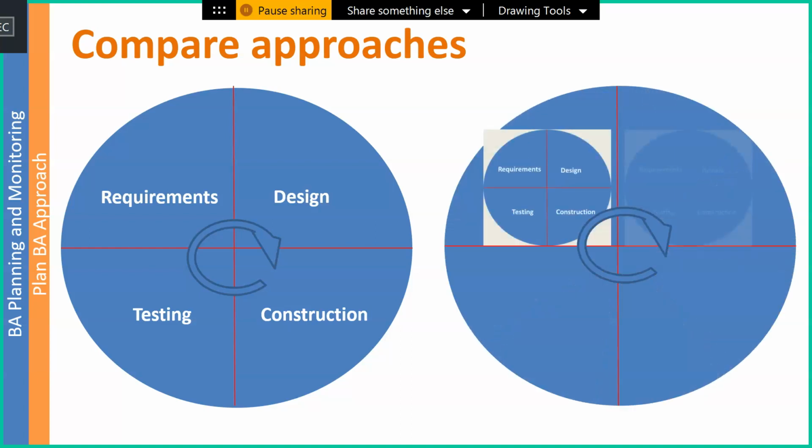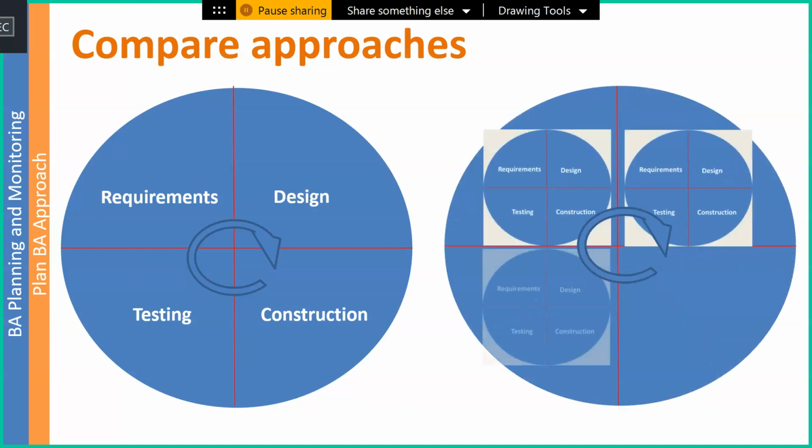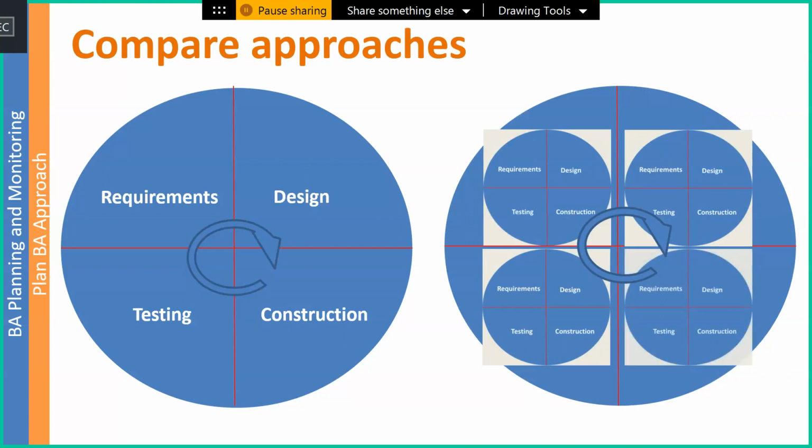Adaptive is where I do these changes in cycles, and I do only as much change as necessary for someone to be able to leverage it, so that I can learn from that while I'm already moving on. Adaptive is where I do the strategy for the long-term view and the long-term picture. The expectation is that I do strategy analysis. Strategy analysis is not sped up for adaptive. It's what it is.